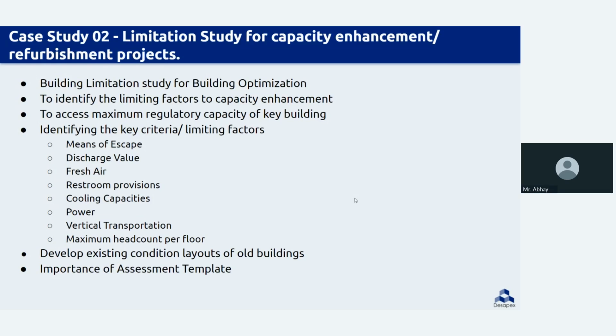So if we proceeded with the available data, the purpose of the study would not be served. So we first planned to capture the existing condition of the building by laser scanning. This provided us with the condition of the building and helped to develop the refurbishment plan.